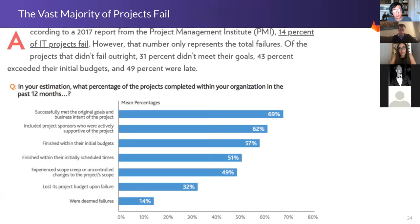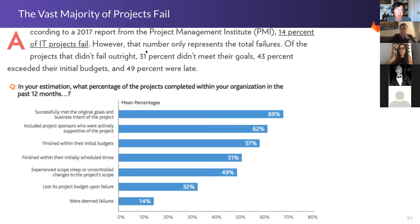This chart is super important. We talked about what engineers do and the emotions behind it. In 2017, a report by the Project Management Institute found after a meta-analysis that 14% of IT projects fail outright. But that only represents part of the total failures — of the projects that didn't fail outright, 31% didn't meet what they set out to do originally, 43% were over budget, and 49% of projects were late.